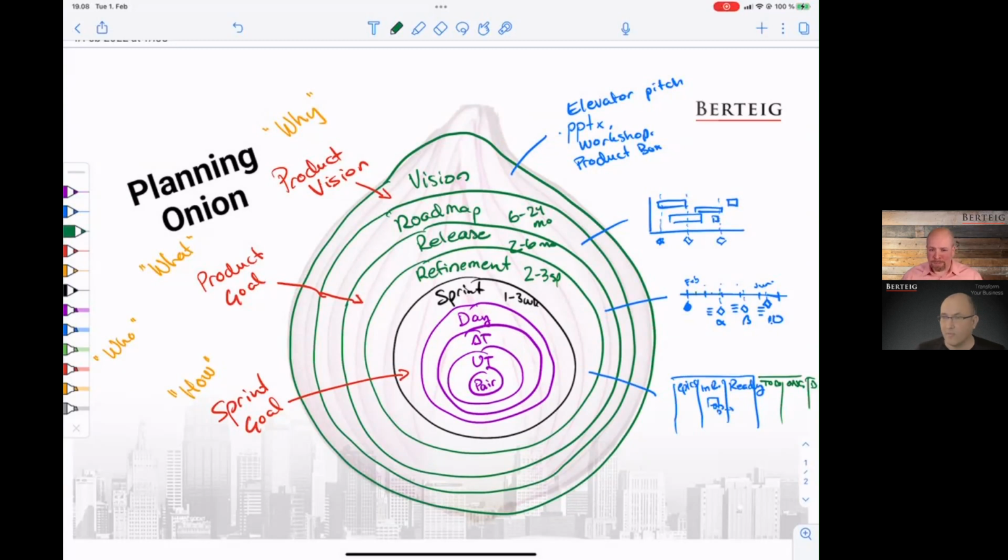Yeah, and one thing I'll add is that the blue line between ready and to do is a really important line, because that's the commitment point. When something crosses from ready into to do, that's the team saying, yeah, we're going to do this, and we're committed to it. It's met all the conditions. This is important because a lot of organizations don't have a very clear understanding of what it means to be committed to work in an agile environment.